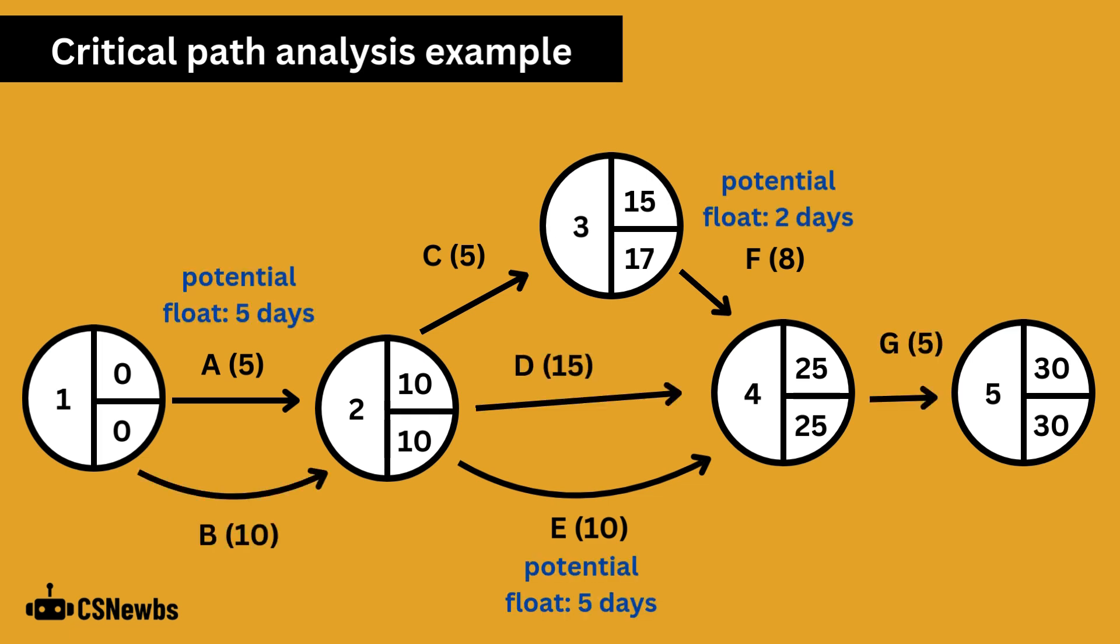We identified the float of two days on node 3 as we were working out the latest finish times, but there's also float on some other activities such as A. Because activity B takes 10 days but activity A only takes 5, and node 2 is dependent on both A and B, there's float of 5 days for activity A. So we could potentially start activity A on day 5 and it would still not delay the overall project. Activity E also has 5 days of float.